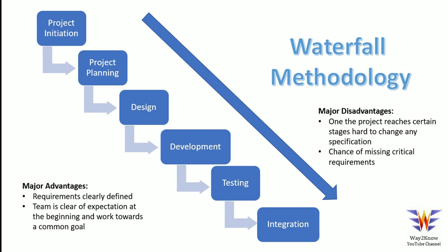So this development involves basically the schematic for the hardware, firmware development, which is required to be ported to the board, and any mechanical related activities for the enclosure. So all these would be part of this. And once this is done, and once the hardware is available, the firmware engineers would be porting the code to this particular board which is being manufactured and assembled, and then the testing would be done. Post the testing, this would be integrated with the entire system and in the field wherever it is required.